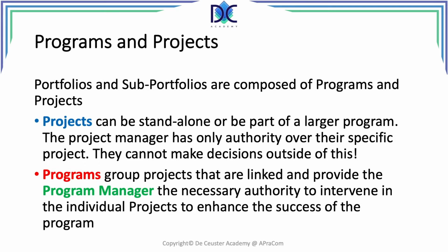In case there are some synergies between different projects, the two project managers cannot synchronize or use their strengths to become stronger. When you see this synergy, you have to create a program. Programs are groups of projects that are linked, and the program manager has the necessary authority to intervene in the individual projects to enhance the success of the program.